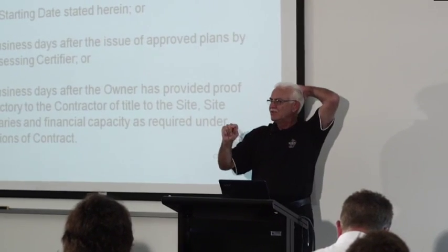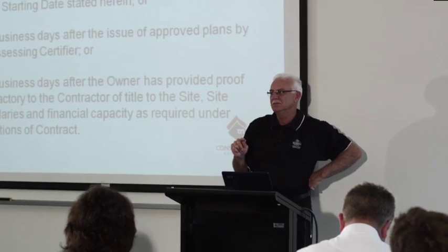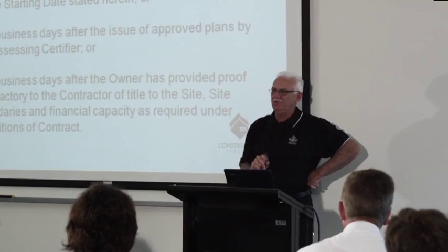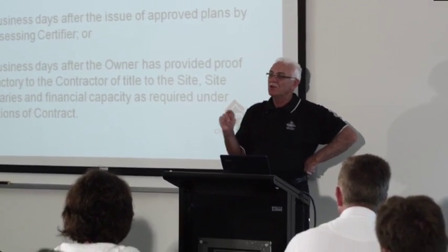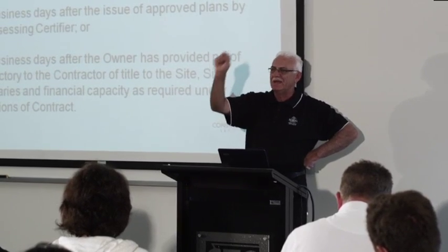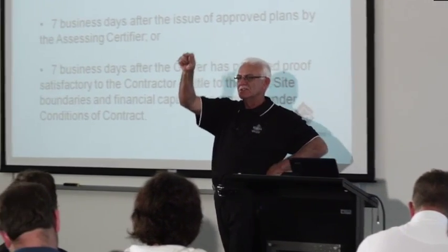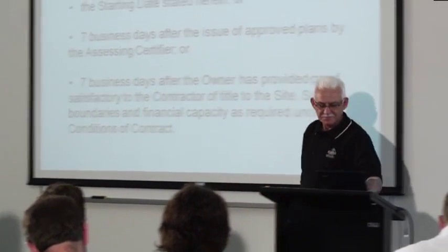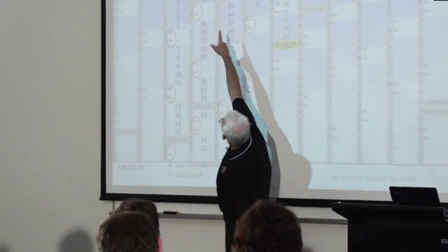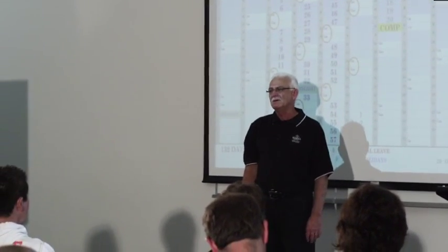So if you're going to be responsible for building approval and certification, are you going to put in there a start date? I think not, because you might not be able to control it. But if you do, your contract is going to start on that actual date. Your contract, not the construction, but your actual contract. So if it goes in for a month, you might find that you don't start until the 2nd of April. You're a month behind before you start.